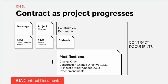Once the project is underway, the contract also includes any modifications agreed to during construction, including changes that affect compensation and/or schedule. These take the form of change orders, CCDs or construction change directives, changes that clarify scope only such as ASIs, or any other contract amendments both parties agree to and sign. Fundamentally they address issues of scope and time and compensation, or things that just change the scope without affecting time and compensation.